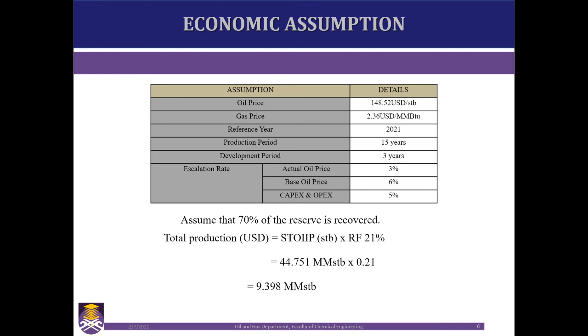For the escalation rate, the actual oil price will have a 3% escalation rate and the base oil price will be 6%. For the capex and opex, the escalation rate will be 5%.